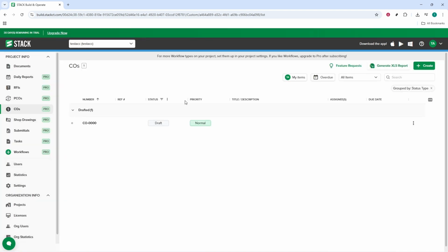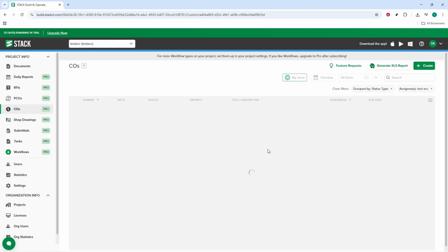Here's a practical example. Filter to show only open issues due this week, assigned to electrical. Instantly, your dashboard becomes a daily action board for that team, making stand-ups faster and follow-up clearer. If something seems missing, double-check status, dates, or assignment. Filters are often the culprit.